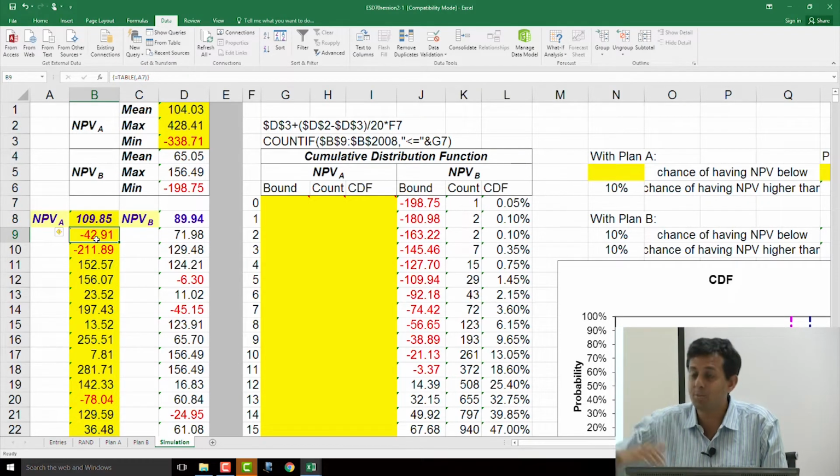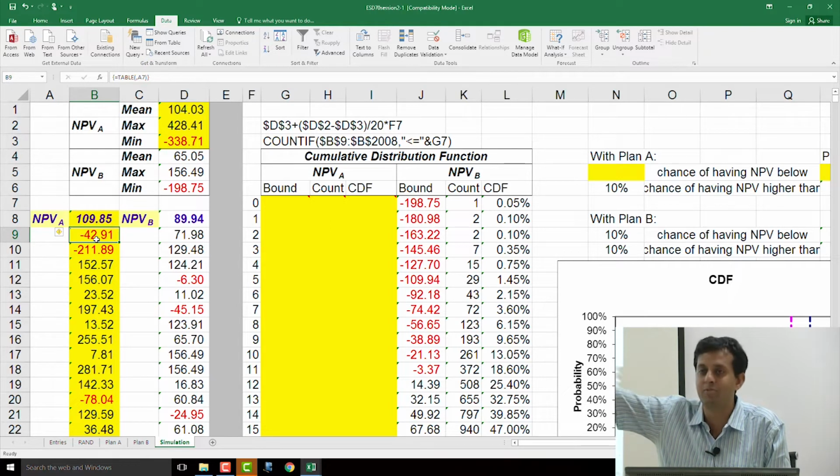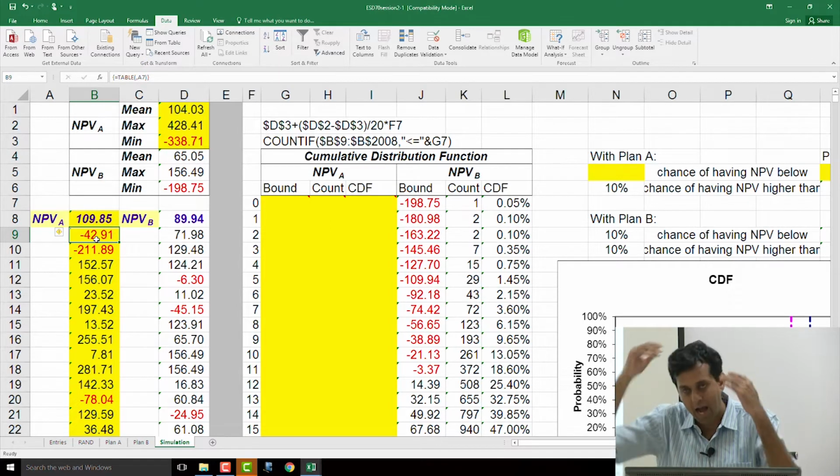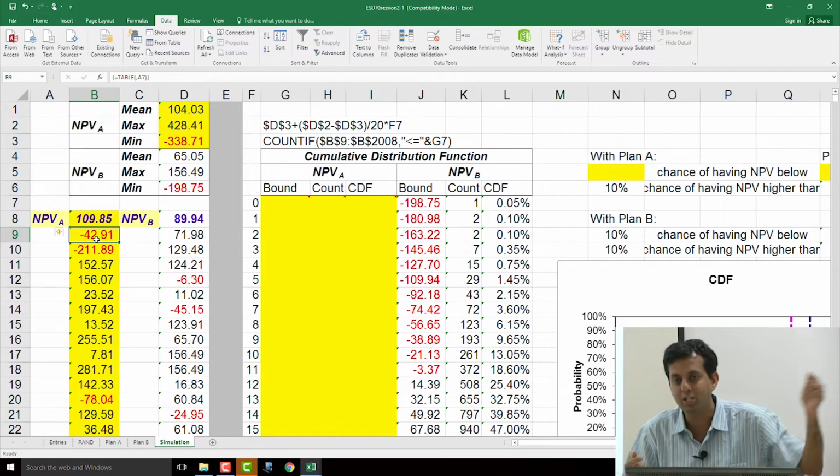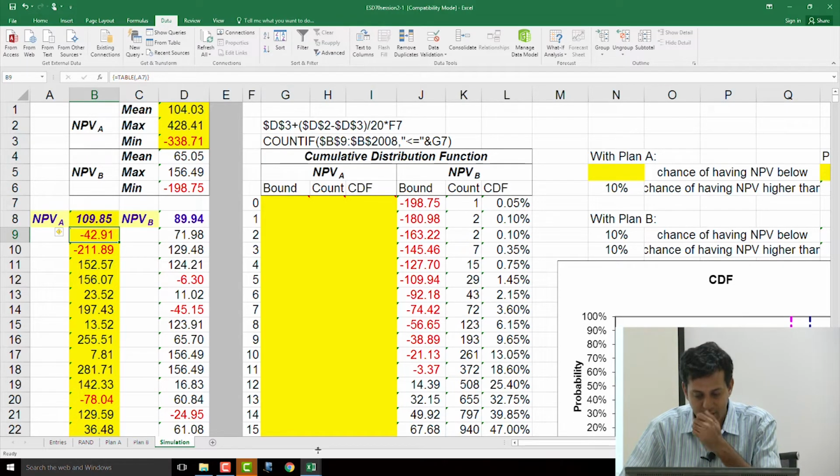So in those cases, plan A is able to sell 750 units, 800 units. I am only able to sell 600 with plan B. That's why the differential between A and B is now getting bigger. Earlier the differential was 5.66, but now that I've started varying, the number of cases where A is better off than B are starting to increase, because in all those demand scenarios where there is overcapacity with regards to B, A is profiting. So this is what is happening here.